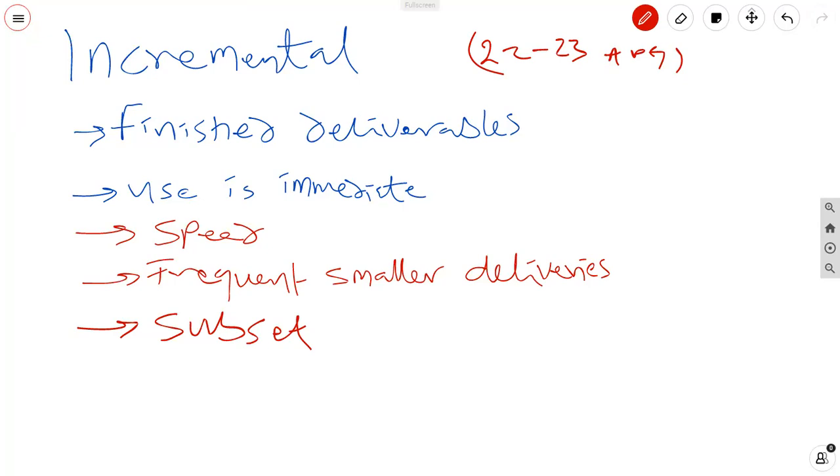So if you take a look, juxtaposing the PMBOK Guide 7th edition on page 37, there's a problem with that because what it's showing is a progressive development and it's showing a house as an example. That's a very poor example because incremental is all about speed of delivery. You cannot speed up delivery significantly when dealing with something like a house. That is a pretty bad example. Now, on the flip side, if you were developing a product, a widget, something that might have been done in a repeatable fashion, it is possible to deliver batches of that thing. For example, a flask or a mug. You could deliver several of those in increments.